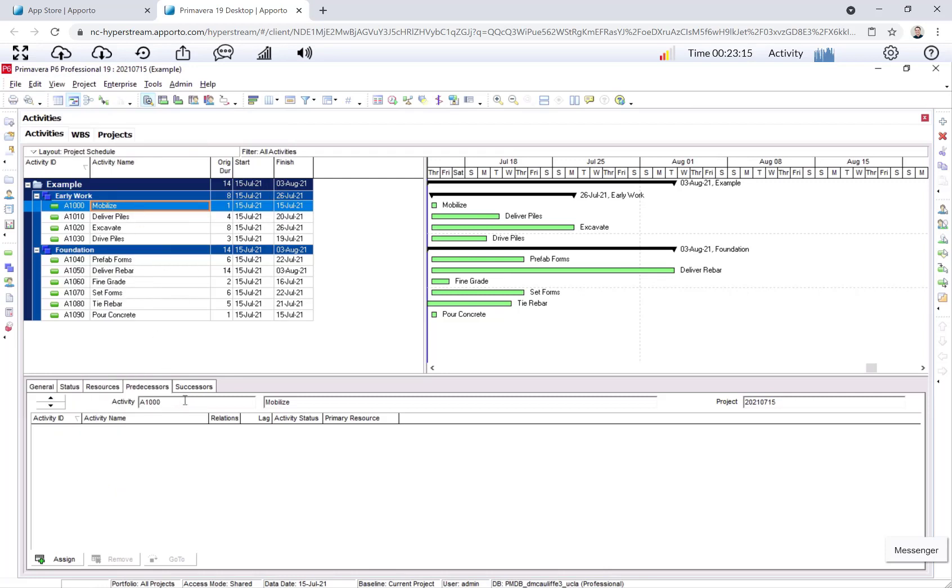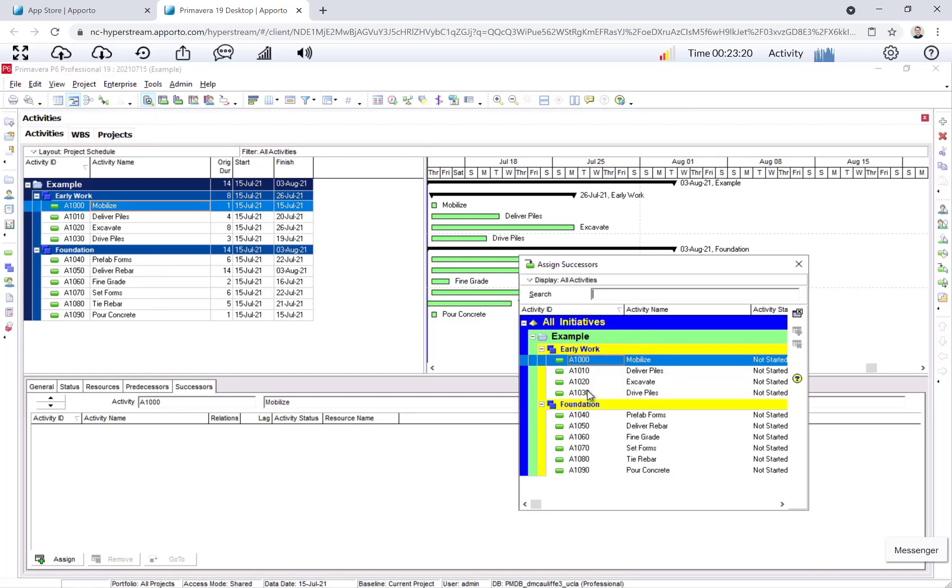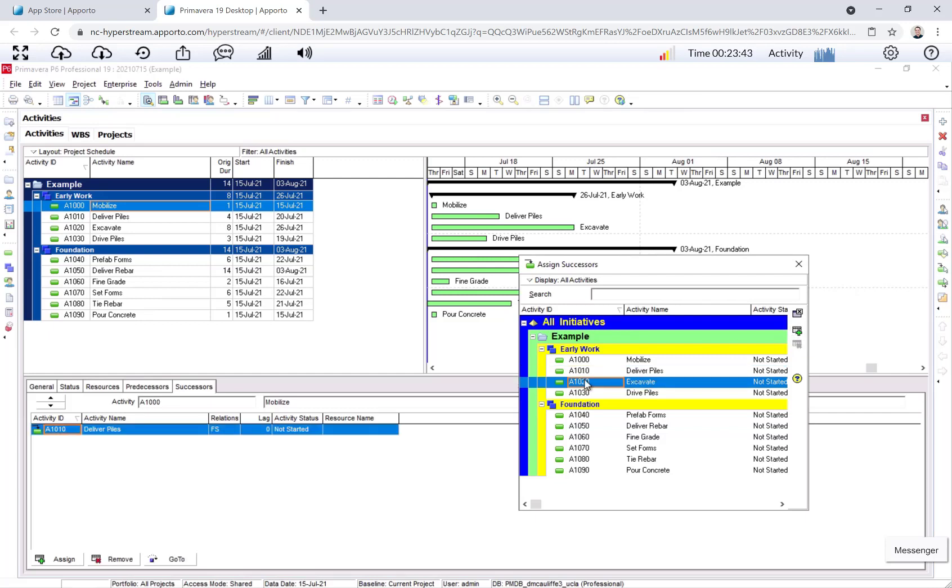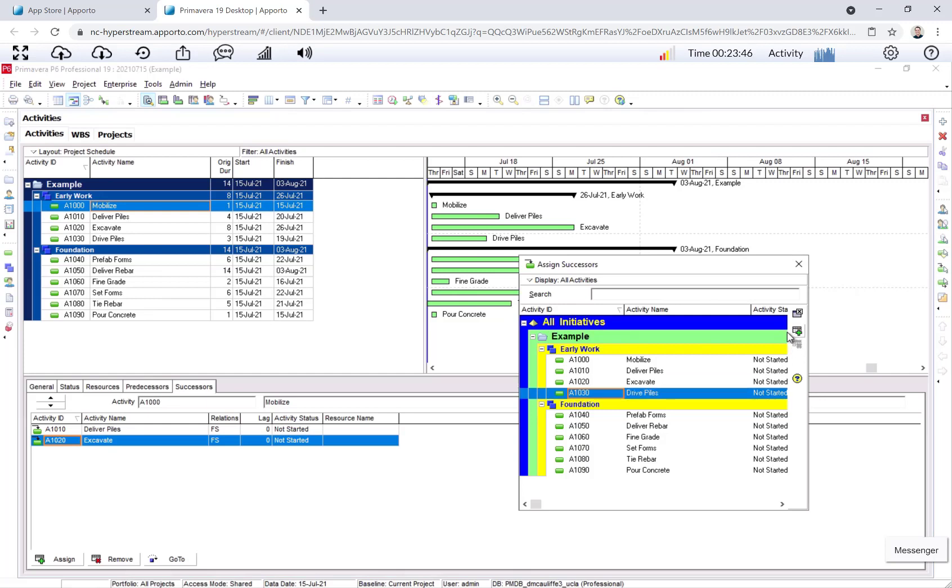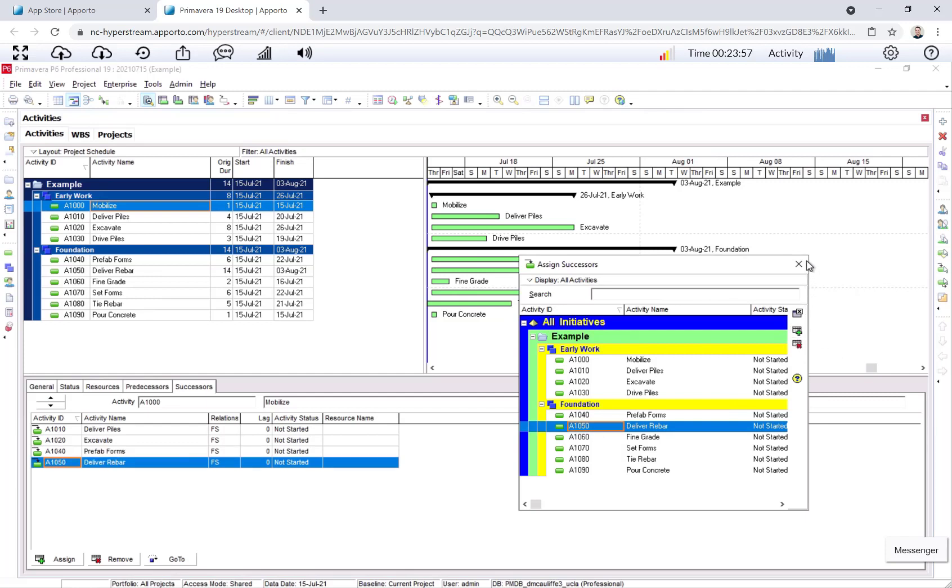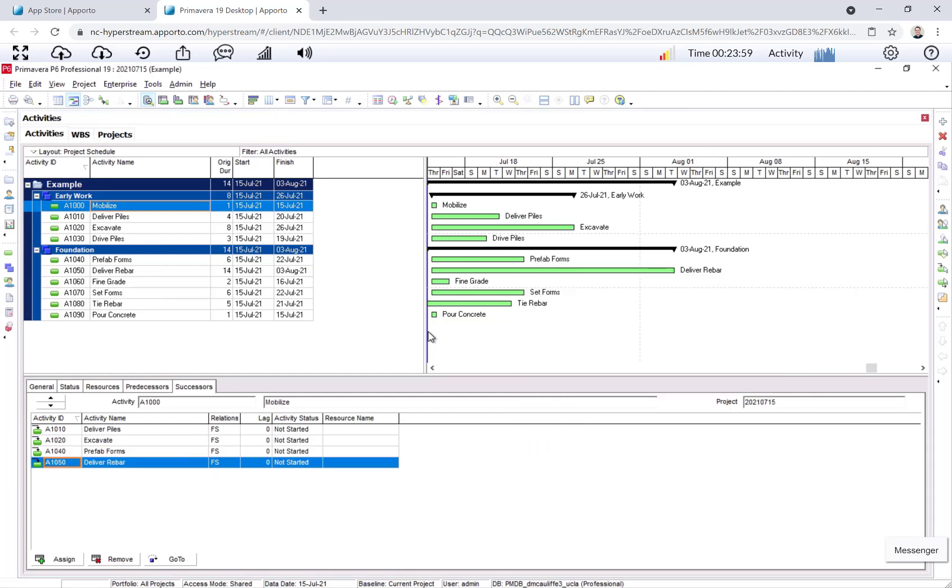Now, Mobilize, I will click on Successors, and I'll click Add. And this is where we select the activities that we want to assign as a successor. So Mobilize, we know we have four successors: Deliver piles, excavate, prefab forms, and deliver rebar. Deliver piles, highlight it, and then you click this green plus sign to assign. Then we have excavate, prefab forms, and deliver rebar. Notice the relationship is finish to start. The finish of Mobilize dictates the start of these successor activities. That's what we want. It defaults to the most common relationship in scheduling.